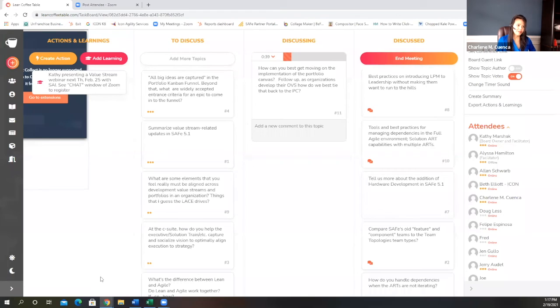And then as we continue to iterate over that, the guidance with the use of the portfolio canvas is, if we have a clearly defined business area and portfolio, we can use that canvas to define how we're set up today, and then also do some experiments to say what kind of portfolio or business area we want to be 5 years from now, and use the deltas between the two to help us develop a portfolio vision for that change.